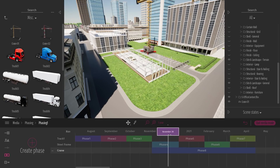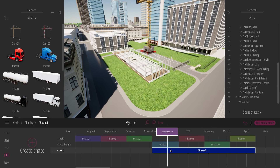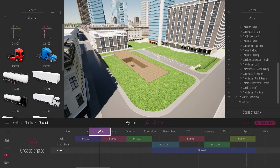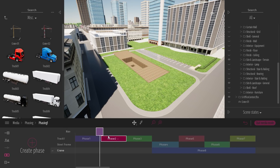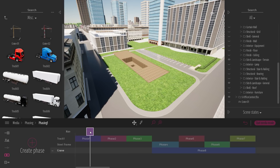You can use the phasing tool like this to show construction steps. In the more options, you can select the start date of your construction project. You can also disable the date, which lets you use the phasing tool in a different way — for example, to show design variations of a project rather than time-based construction steps. Each phase can represent a different design option, and you use the phasing tool to present those different designs.